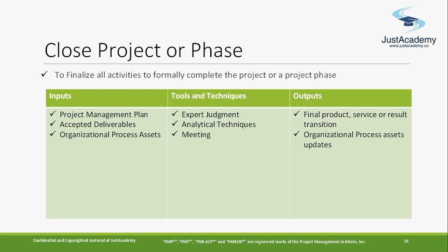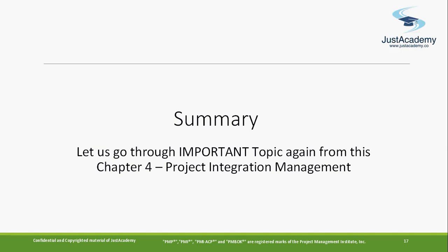The final output will be the final product, service or result, whatever you're building, and you'll be updating your lessons learned document throughout the project as part of this process, covering what has gone good or bad, and then the final training document. All those things you will be updating as part of the organizational process assets updates. Every organization has this repository where they keep those details, so the next project can benefit from this project. If similar projects come in future, they can refer to that project data and benefit from it. Yep, really important. Good.